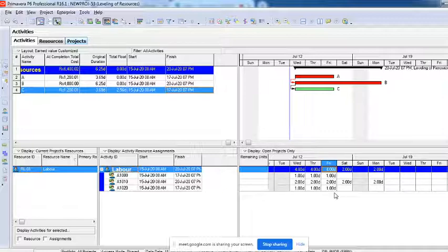Say that there is an activity for 10 days and we have already planned to use 100 units of resources, means per day 10 resources, and totally 100 resources to do that work in 10 days. Right? Now this is constant. Units per time into duration is equal to work.